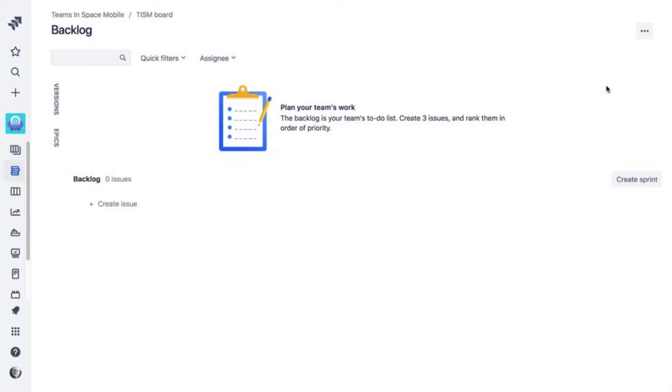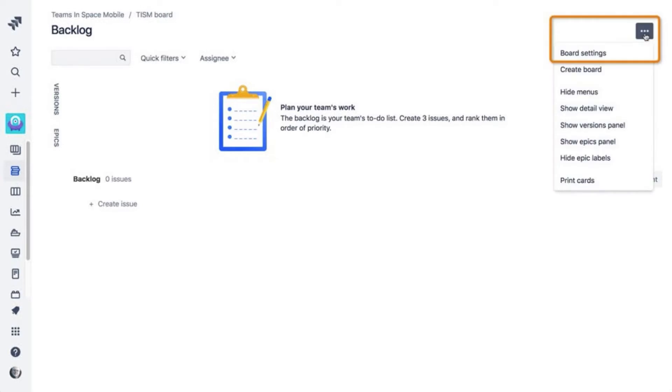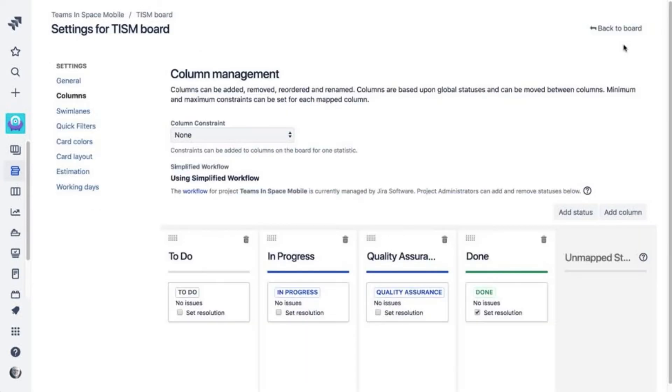To add a quick filter, from your backlog, click More, then Board Settings. Select the Quick Filters link.